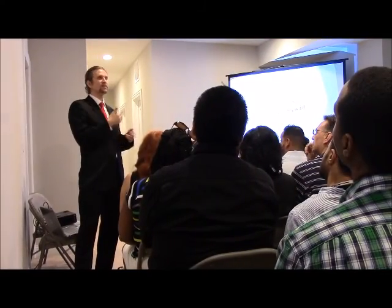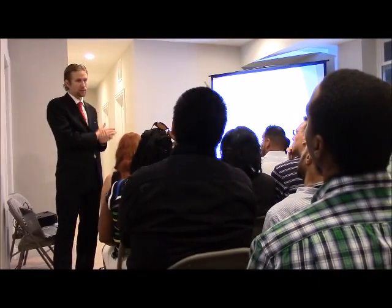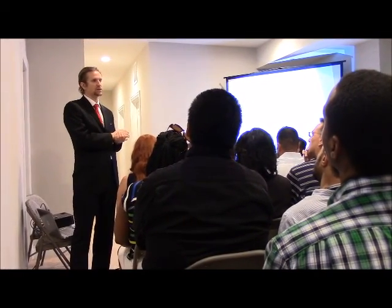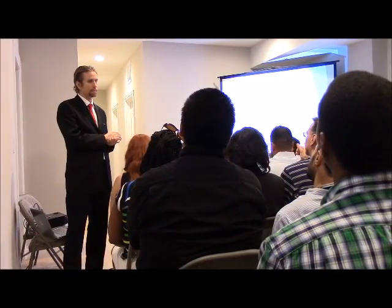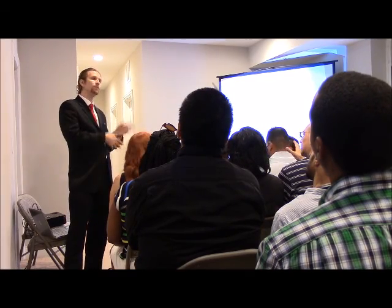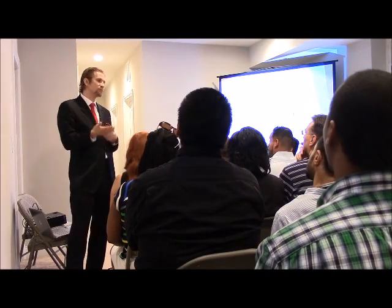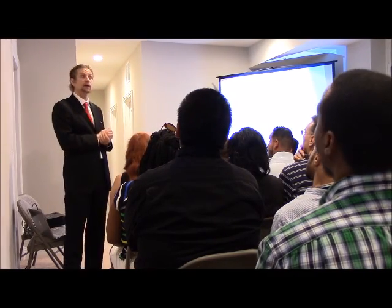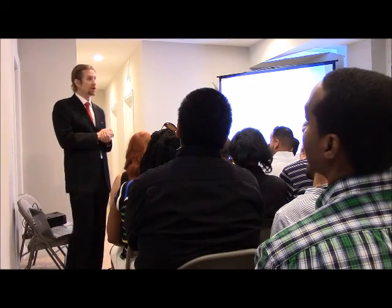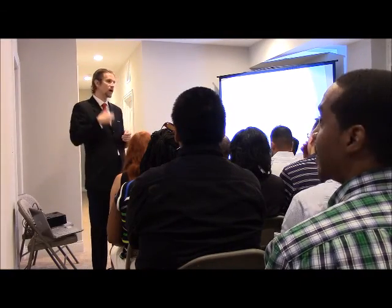You have a payment schedule with that electrician, that plumber, and that HVAC person. But are the disbursements always after the inspections, is that how you do it? That's how we do it. Some people might require some money at a certain point before the inspection, but we're not giving them a bunch of money until it passes, because we want to make sure the work they did passes. So that is correct.